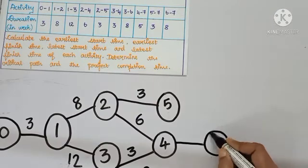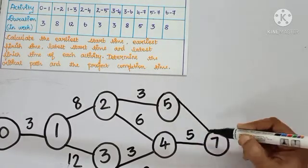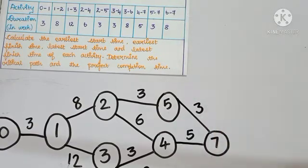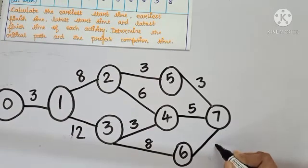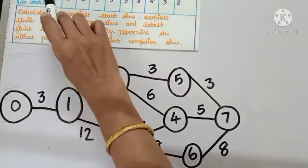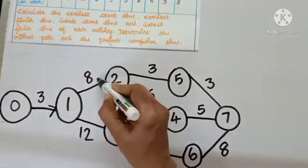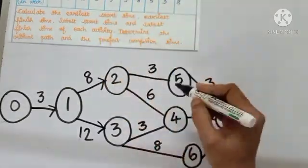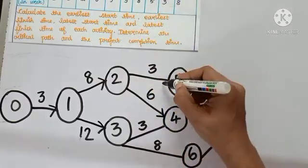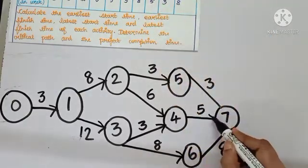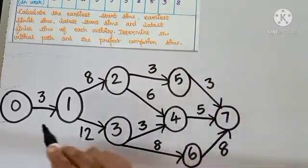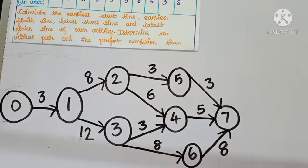Four to seven, duration five; five to seven, duration three; six to seven, duration eight. Reading the diagram with all arrow marks: zero to one, one to two, one to three, two to four, two to five, three to four, three to six, four to seven, five to seven, six to seven — the diagram is complete. Now we need to calculate the E and L values — earliest starting time and latest finishing time.